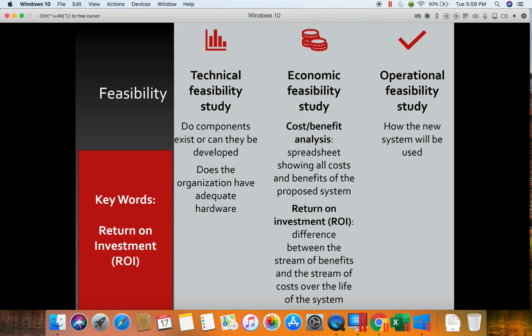There was a high risk of failure because the existing employee would not be interested in change. And so they decided to hold off till that person retired and implement the system in a few months after that individual had left the organization.